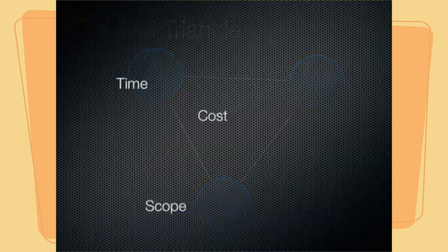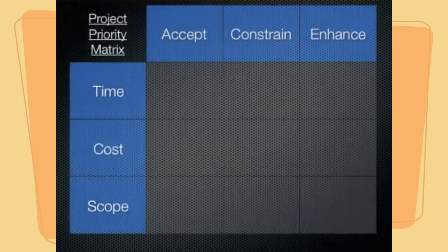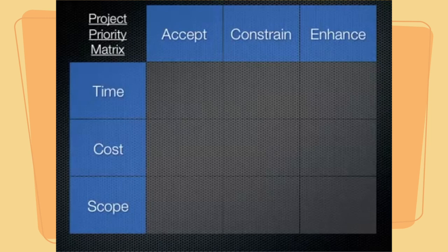In this matrix, we consider these three elements of the project and three ways that we can balance these elements against each other. First, we can either accept changes to one of these three aspects, we can constrain an aspect — meaning it is a priority that this aspect not change — or we can choose to enhance a particular aspect if possible, that is, to make it better.